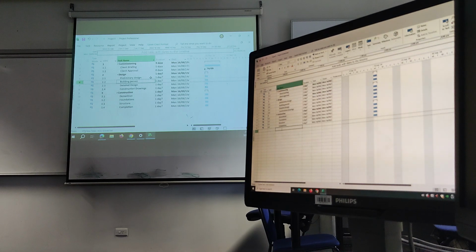What you can say is when we've finished everything on the first floor, that's the date it should be finished. So you say all these tasks here, when they're all finished, that's when that milestone happens. When you're building it, you would look at it and say, this is the date we should have finished the first floor, this is the date we have finished the first floor. Generally we're behind or generally we're ahead.